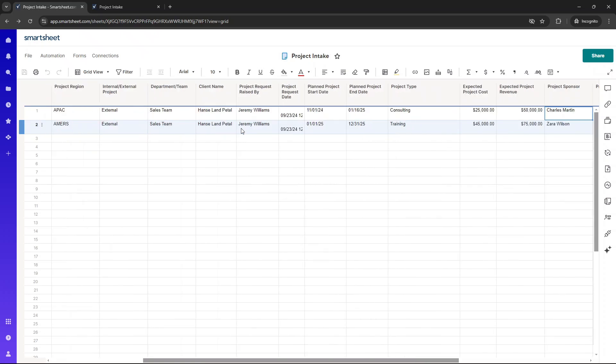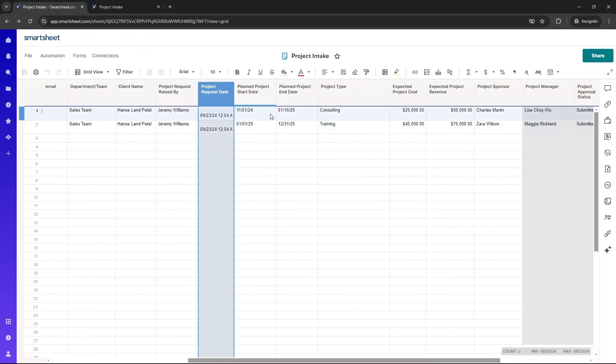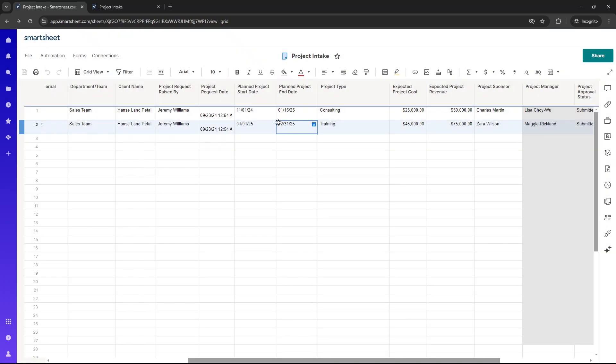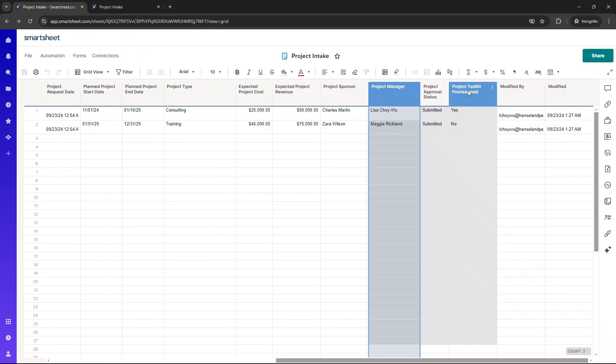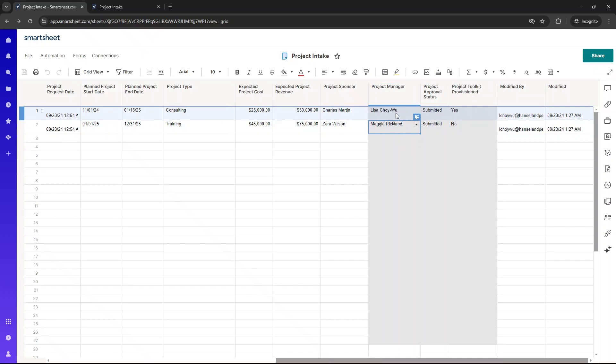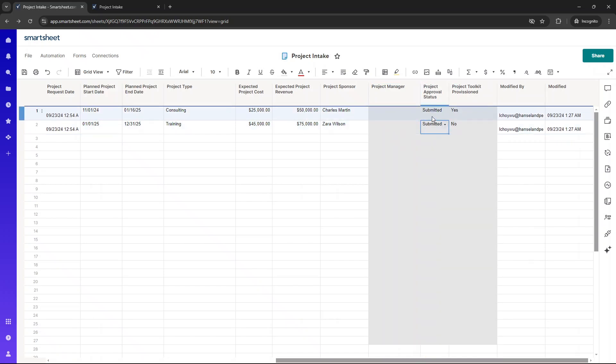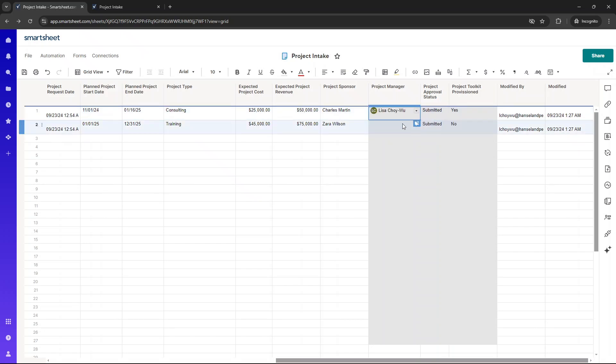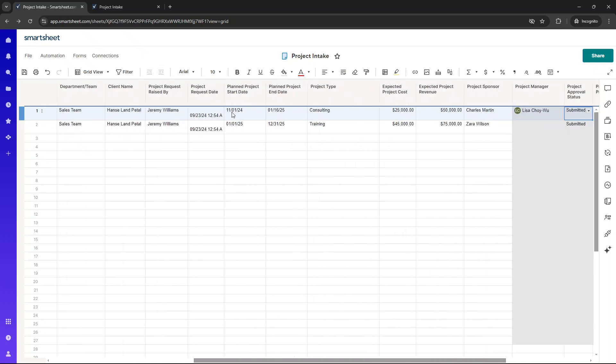The other thing I would do is when you start getting, you know, project requests, I would then... This is when I'd start tapping into this. This is when, as the admin users, I'd start, you know, maybe monitoring this sheet once a day, once a week. Depends on how many project requests you're expecting. And this is when I'd start manipulating this thing. So let's just say these came in. This project came in. I'd go in as an example and I'd assign Lisa. So let's just say Lisa works in APAC. She, you know, she's the project manager for APAC. I could see that it came in a project request for an APAC project. I would then assign Lisa.